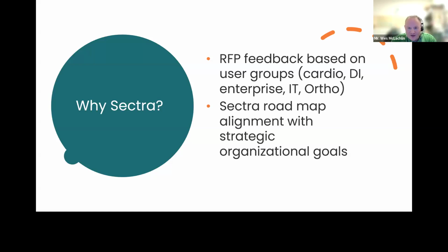One of the challenges that we did run into, however, is the fact that doing this through the course of an ongoing pandemic led to severe communication fatigue throughout the organization. So that was one of the lessons learned that we had as a takeaway: how do we alleviate communication fatigue throughout the organization in managing that change?